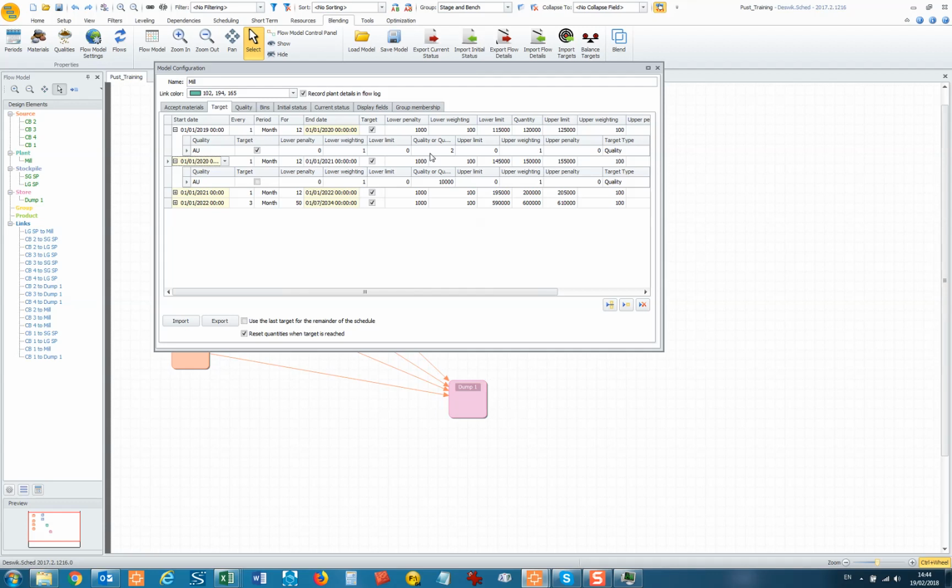Well, also, as a mining engineer, it's impossible to actually target a certain grade in a month. You just physically can't do it. Exactly. Because you've got so many other constraints. So it's better to more simulate what you do in the field than have some sort of analytical perfect. If you see a grade profile and it's just like that, then you already know it's completely wrong. It's never gonna work like that.